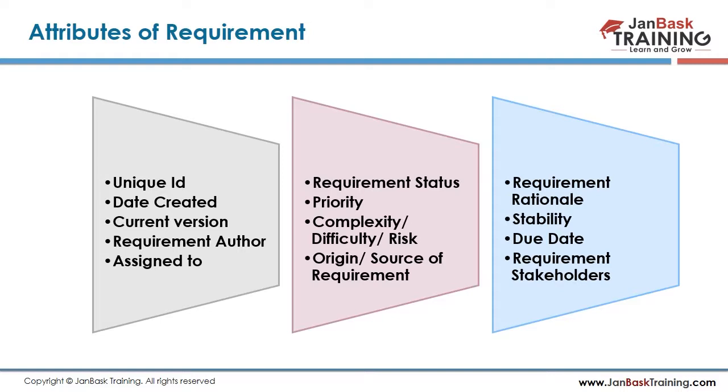What happens is, when you are in the document creating phase, every time you're having a discussion with the client and making changes based upon it, you need to make sure that every time you create a version, you record what you changed in the previous version and what you're changing in this particular version. So the version even needs to be changed at regular intervals.